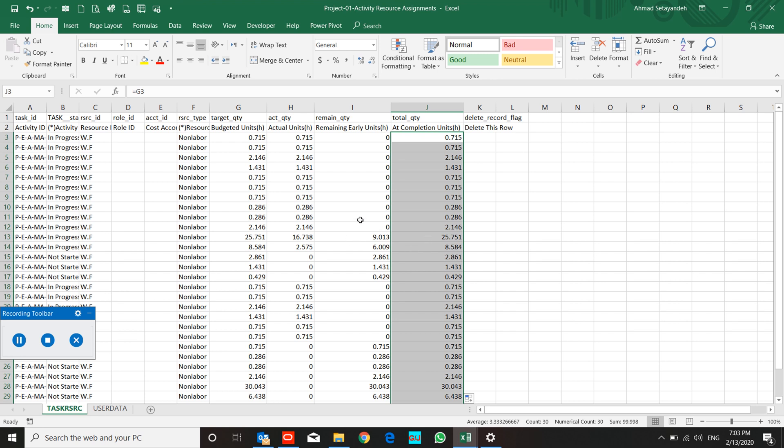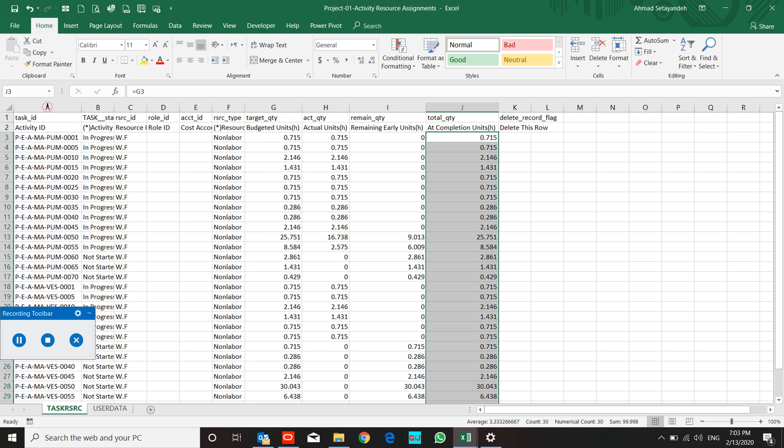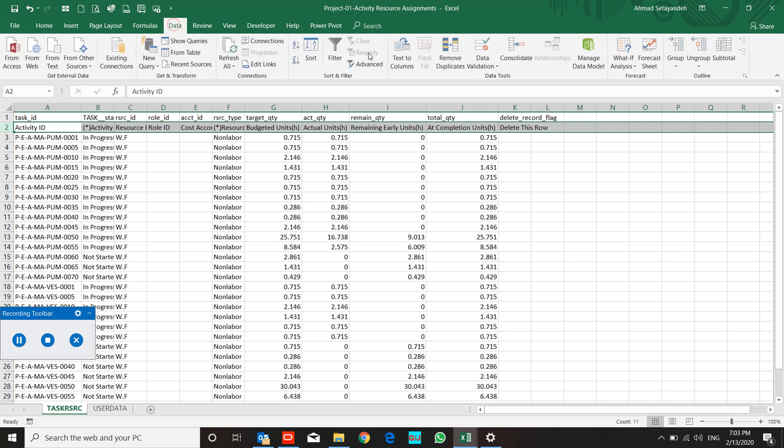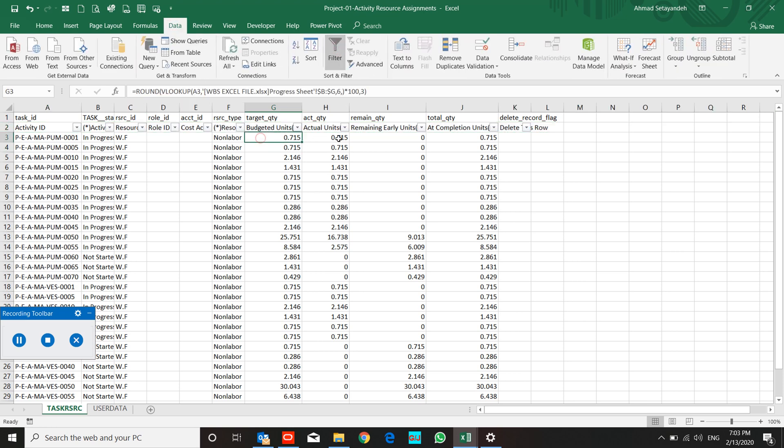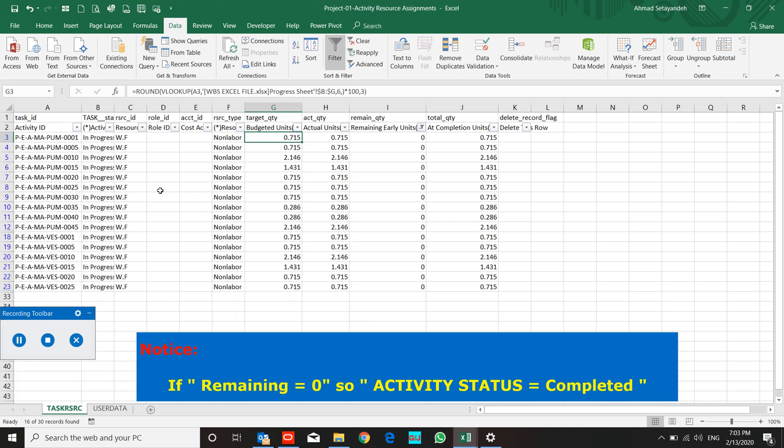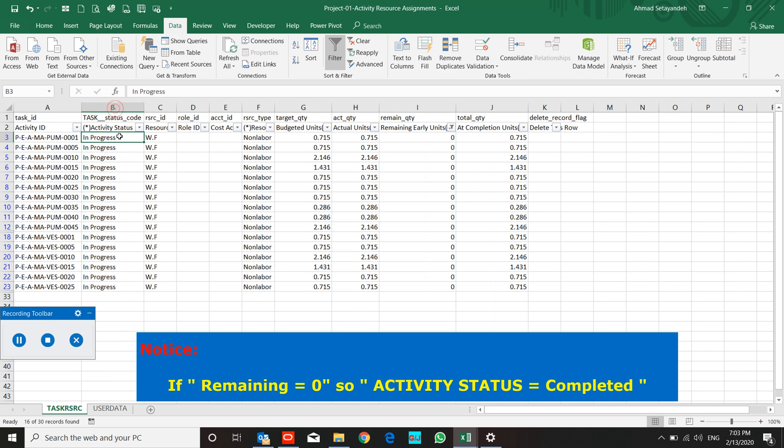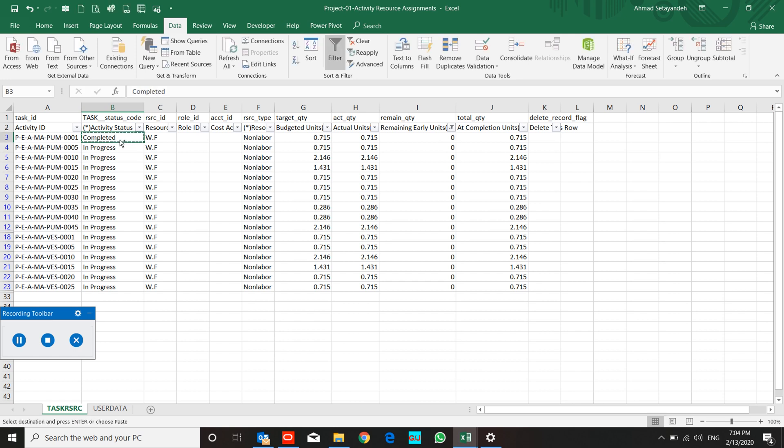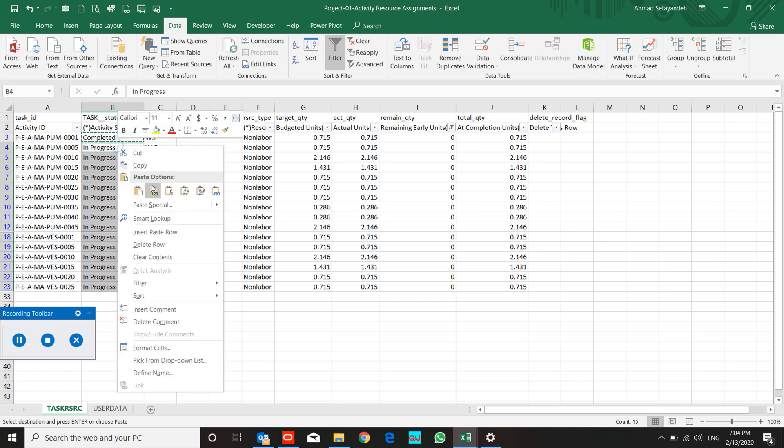And use filter for when remaining duration equal to zero, remaining quantity for budget equal to zero—it means your activity status must be completed. So I change them from in progress to completed.